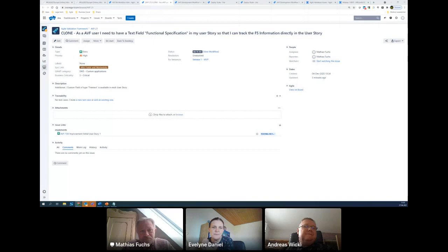Was it your question, Andreas, related to that? Thank you. Ideally, for the first release, the planning phase will of course be quite huge, because initially you have to do all the supplier assessments. You have to create the validation plan, and the risk and the system risk assessment and so on. In the next release, it might be a matter of maybe 30 minutes of the right people sitting together and just